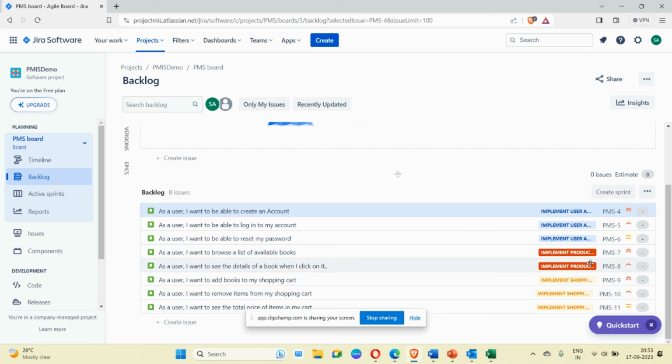Okay, for example, in this particular case, developer 1, developer 2, developer 3 will play the planning poker game in Jira, which is also available, or they can play with cards. They will have cards with the Fibonacci series numbers, and based on their selection they present the card, so that a common number can be chosen among all the developers.